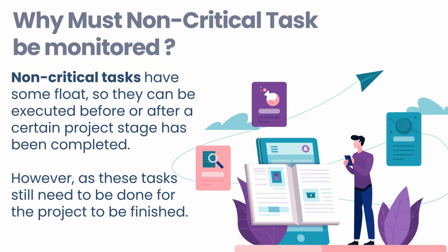One last point I want to discuss is why you should also monitor the non-critical tasks. The CPM is basically identifying your critical tasks. But the point is that when you're completing a project, it's a combination of both, critical and non-critical tasks. If you only focus on critical tasks and are not worried about the non-critical tasks, at some point those tasks can become critical. Remember, by doing just critical tasks, you cannot complete the project. You have to complete both non-critical and critical tasks.